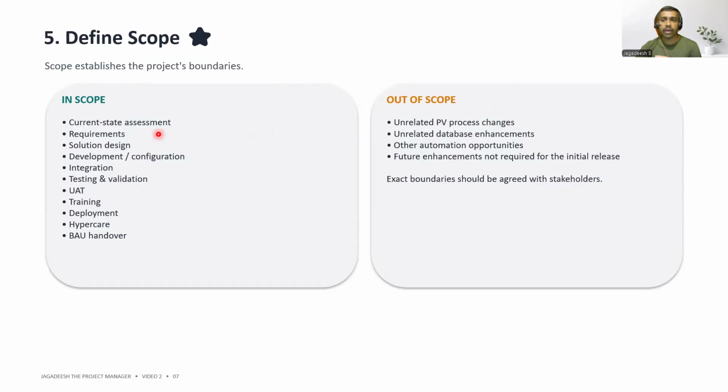For example, in scope: current state assessment, requirements, solution design, development and configuration, integration, testing and validation, UAT, training, deployment, hypercare, and business as usual handover.